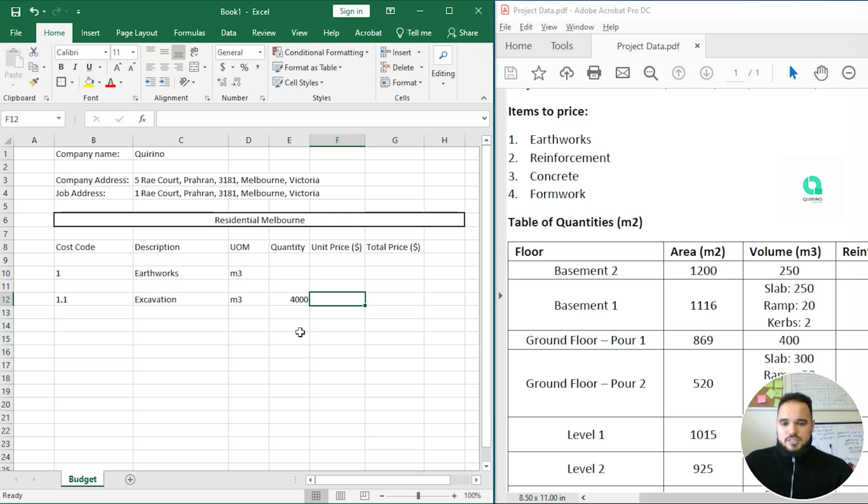To change it from hours to cubic meter, based on other projects, you need to get the amount of hours that the worker and the machine worked there, and then you divide it by the amount of cubic meters that they did, right? So in this case, I have already done that, and my number was $65